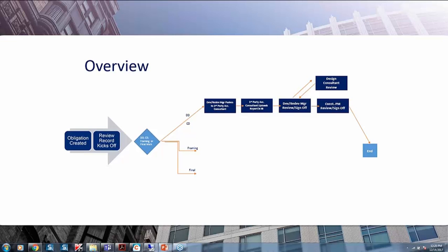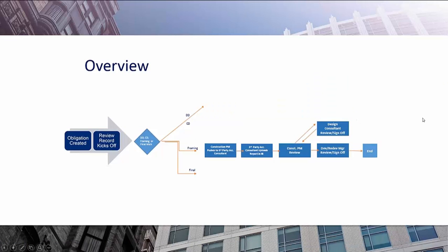If instead we were going to go for framing, that looks just a little bit different. So the framing starts with the construction PM. They push it on to the third-party accessibility consultants, who then will push it back to the construction PM before you go back and forth with the design consultant as needed, and then on to the development or redevelopment manager before it goes to end.